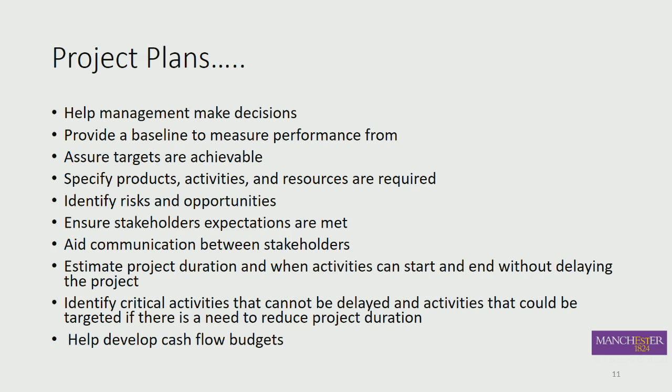And that's having the right expertise to develop it. You must first develop the logic of the plan, so you work out how it fits together. And then you do some time estimates. From my perspective as a cost engineer, I'll be trying to work out how long these activities will take, assuming a certain level of resourcing. So there might be a certain number of software programmers, machining operators, and assembly engineers available, considering that there are other projects going on as well. So I'd make a time estimate.